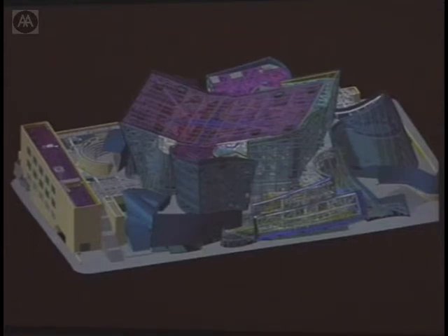In this case, the senior partner at Gehry that I work with very closely, Jim Glymph, he works in a different way. He says, look, we're going to issue you a design specification and a performance specification. What that means is we want the design, or rather the solution that you're going to propose, Mr. Fabricator, to perform in a certain way. That means it has to perform structurally, it has to perform economically, meaning to the budget, it has to perform thermally, acoustically, and also obviously it has to perform aesthetically, meaning that it actually has to implement the kind of project that you're trying to do.